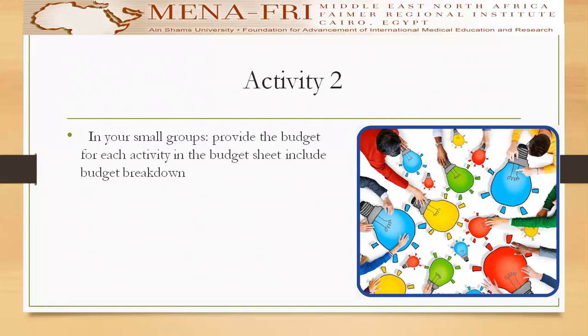Then you ask yourself, how much is my purchase cost? And then you add all the purchases that you had to buy for all the tasks, and this is your purchase cost. When you add these amounts all together, take care that usually your university takes an overhead of about 10 to 20% of the total budget. So now that you know how much you actually need for the project, you increase the number by 10 to 20% and make sure that the total budget amount has this amount included in it.